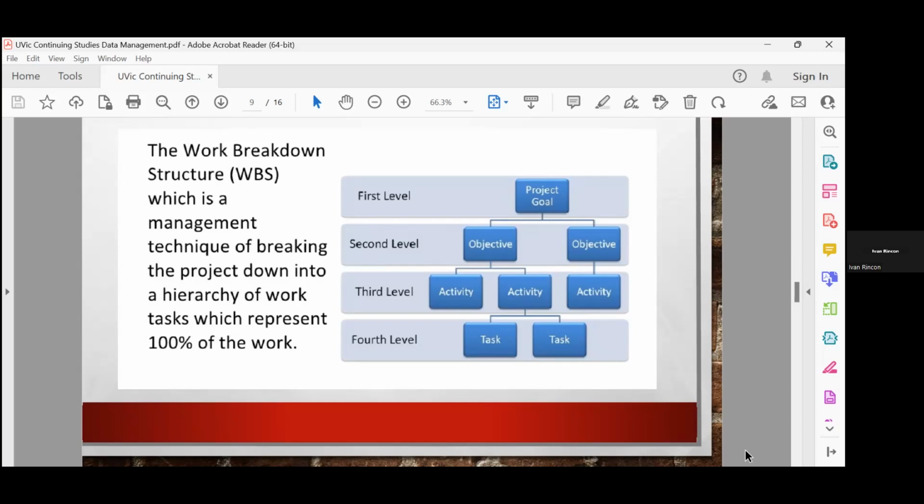As simple as that. The way that we express this typically in project management practice is to say that anything that is not in the WBS is not part of the project, or the project is comprised of everything that is in the WBS, right? So if you're doing a data management project and somebody tells you, oh, what is the manual of the application that we're running here? Well, is that in the WBS? No, okay. That means it's not my responsibility.